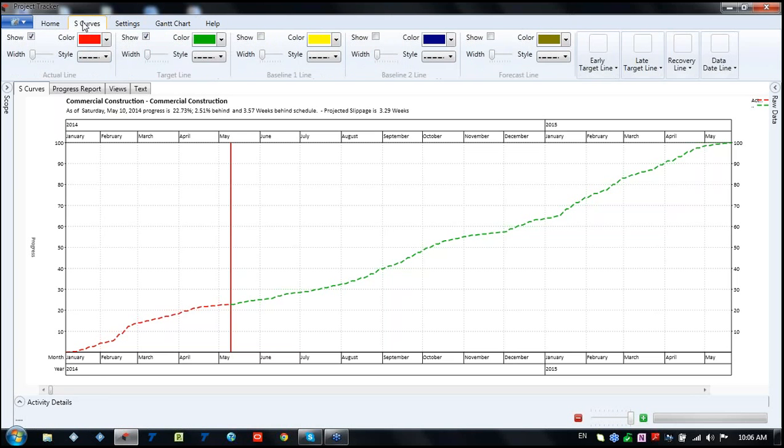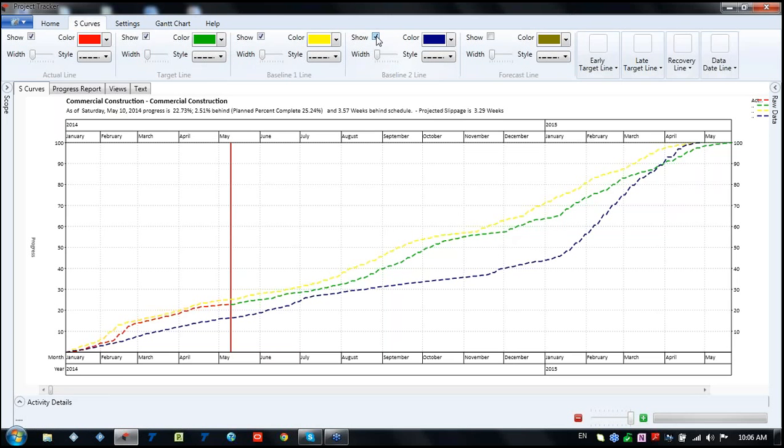One of the settings is that it doesn't only give one curve, it can give many more curves, such as we can show our baseline. You can see we have a baseline curve, the first baseline, as soon as possible. Then we are getting the as late as possible baseline. So this is the baseline, and you can compare it.